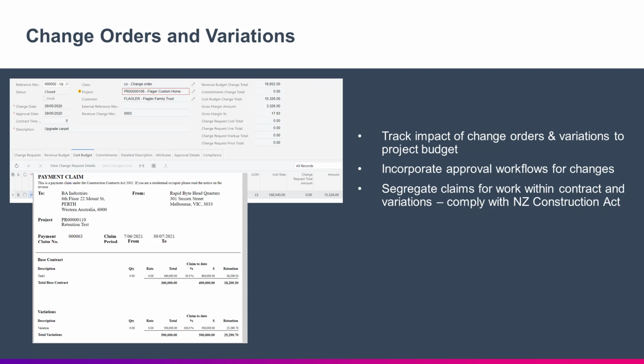The system has also been designed to comply with the New Zealand Construction Act, which requires the contractor to separate claim amounts that are part of the original contract and those from variations.